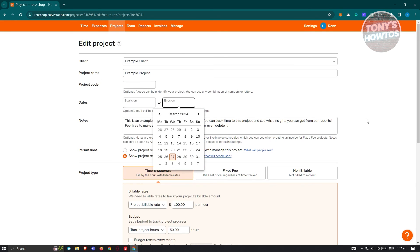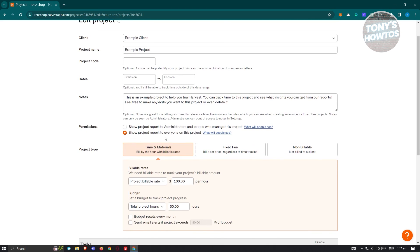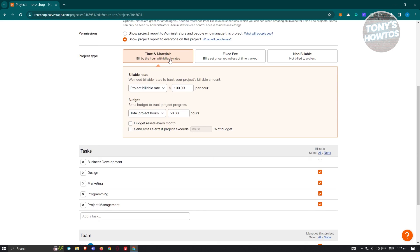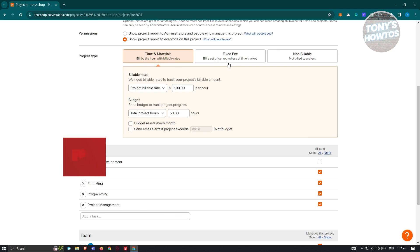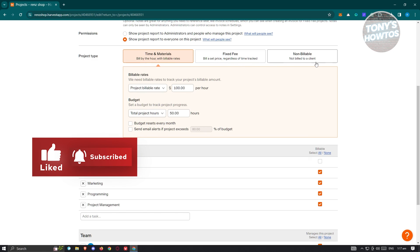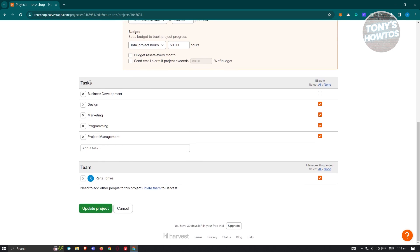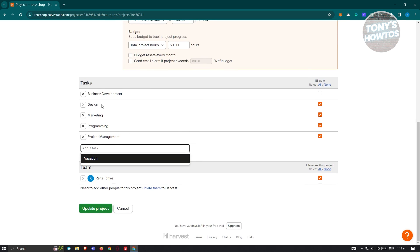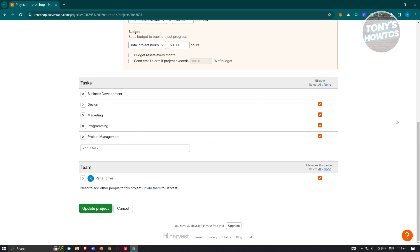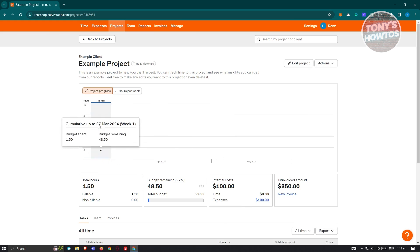You can also set permissions — show the project report to everyone, or only to administrators and project managers. Under Project Type, you can choose Time and Materials billed by hour with billable rates, fixed fee billed at a set price, or non-billable (not billed to a client). You can add tasks such as design, vacation, business development, or project management. Click 'Update Project' to save your changes.